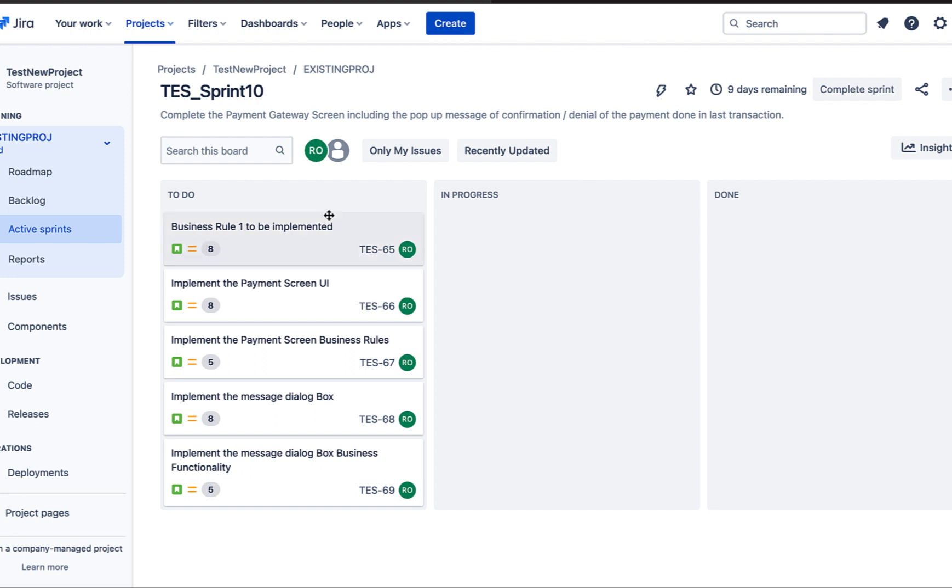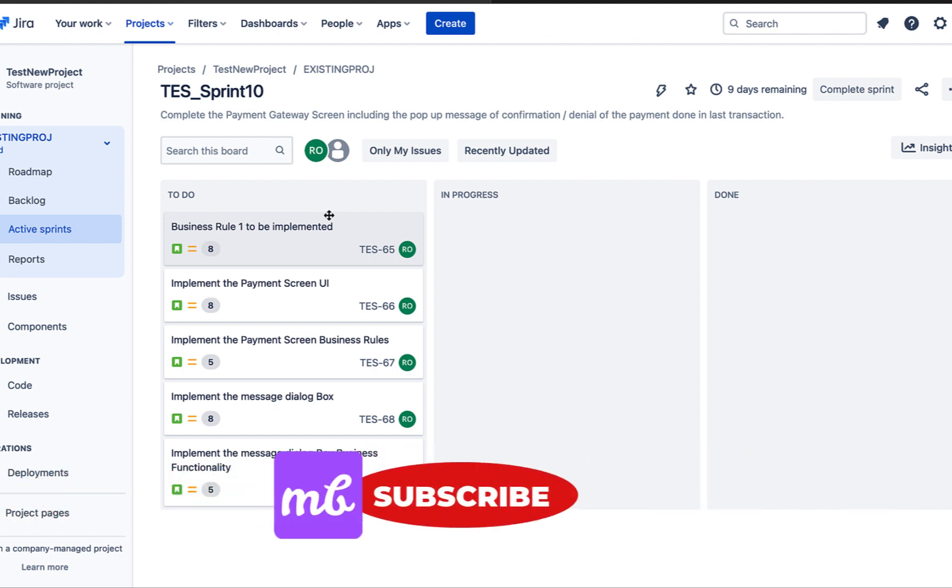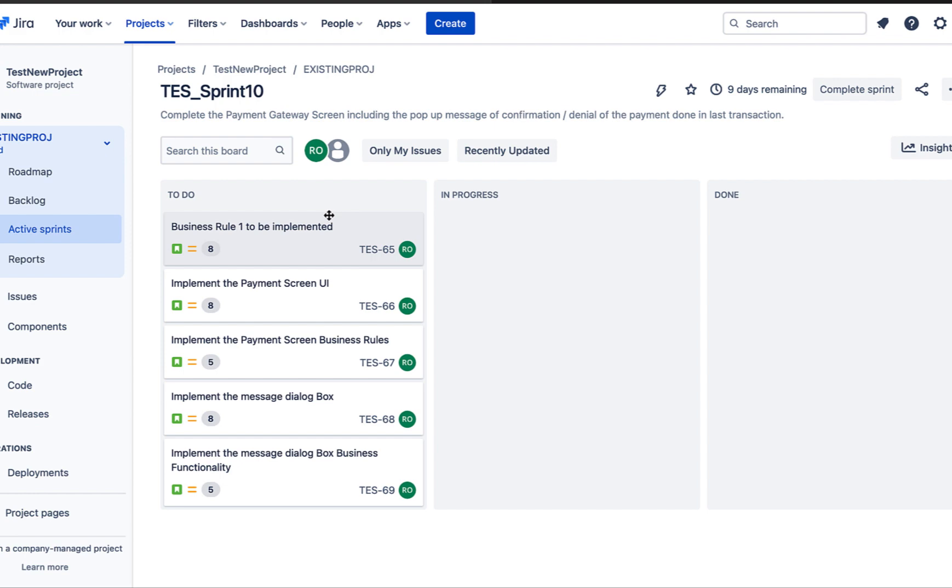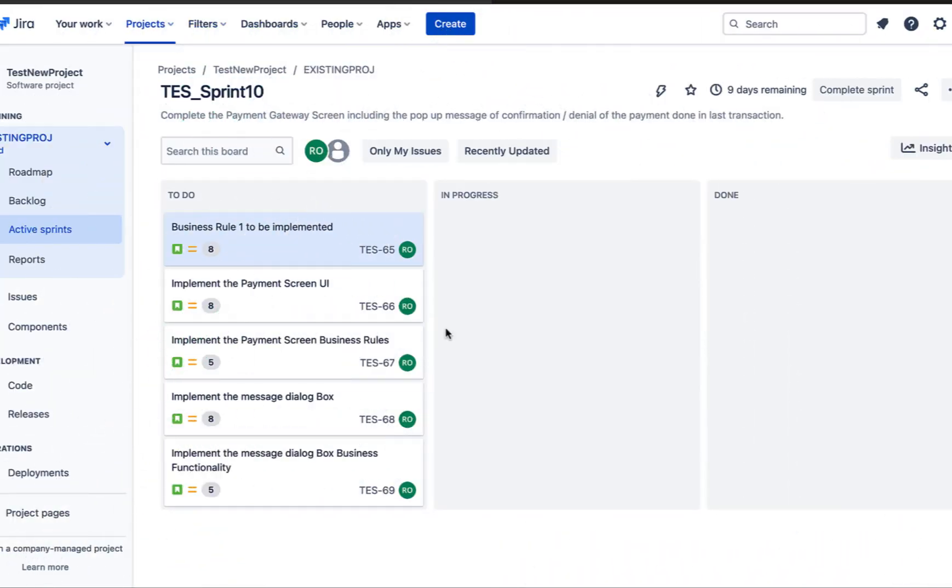One thing which we should be careful before starting our sprint is that our planning for what amount of work has to be completed in the sprint should be very thorough because once the sprint has been started, no changes are accepted. So now our sprint has been started and we are ready to move our issues to in progress.